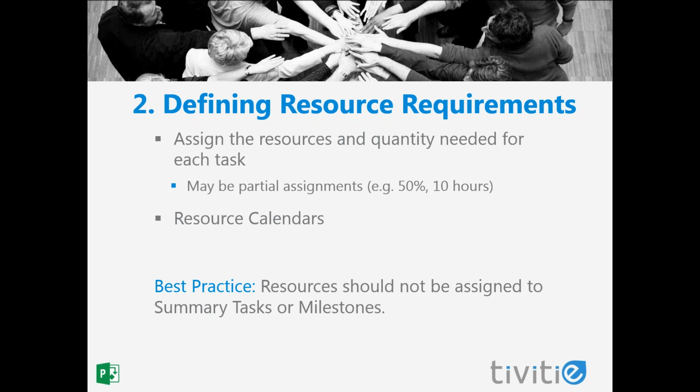As I mentioned, each resource that's created in your resource sheet has a calendar automatically defined for it. You're able to modify resource calendars to reflect vacations and other time off if desired. This increases the maintenance significantly, so only do it if you need that level of granularity in your data. In Project Online and Project Server, the resources and resource calendars are managed centrally. Your organization will make a decision about how they want to reflect time off. As a best practice, resources should not be assigned to summary tasks or to milestones.